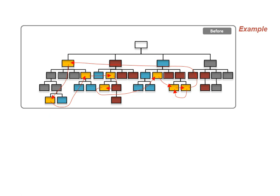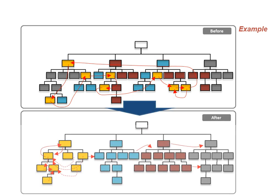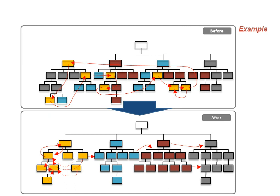It may be possible if you can group the roles in a different manner, such as shown here on the bottom half of this slide. We don't necessarily remove interdependencies, but we may reduce the coordination cost because the people who need to collaborate the most closely are then grouped together in the same team. And this is the basic principle of the approach that I am describing here.